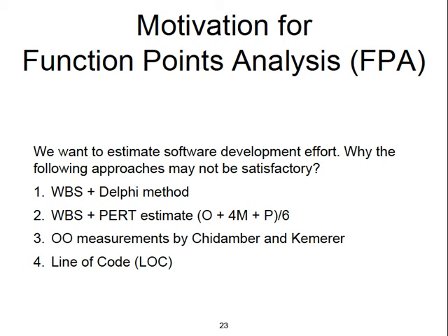But let's say somebody estimates 1 day, another person estimates 7 days, then that is many times difference. In that case, we will have some discussion, and they would go around, explaining why it should take long or why it should take a short time. Then they vote again, or they write down their new estimate. That's called the Delphi method.